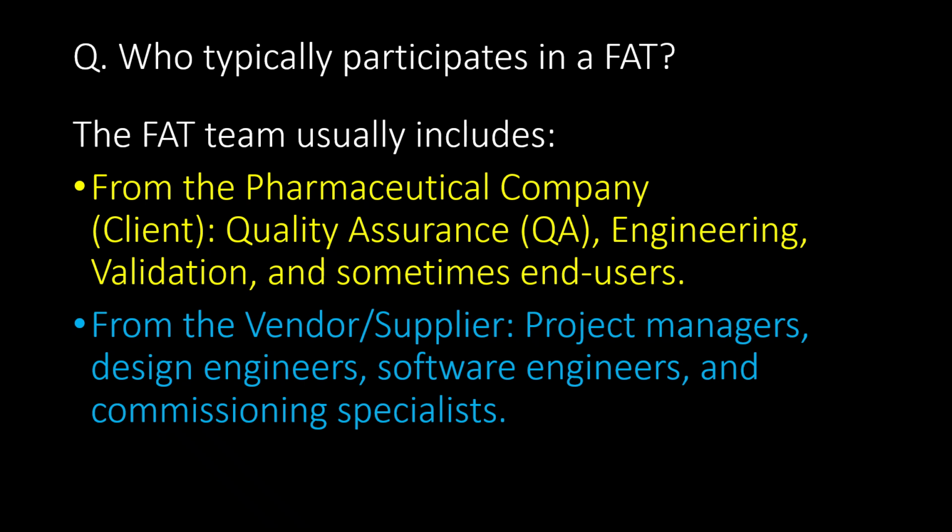Who typically participates in a FAT? The FAT team usually includes, from the pharmaceutical company, that is client, quality assurance, QA, engineering, validation, and sometimes end users. From the vendor or supplier end, project managers, design engineers, software engineers, and commissioning specialists.